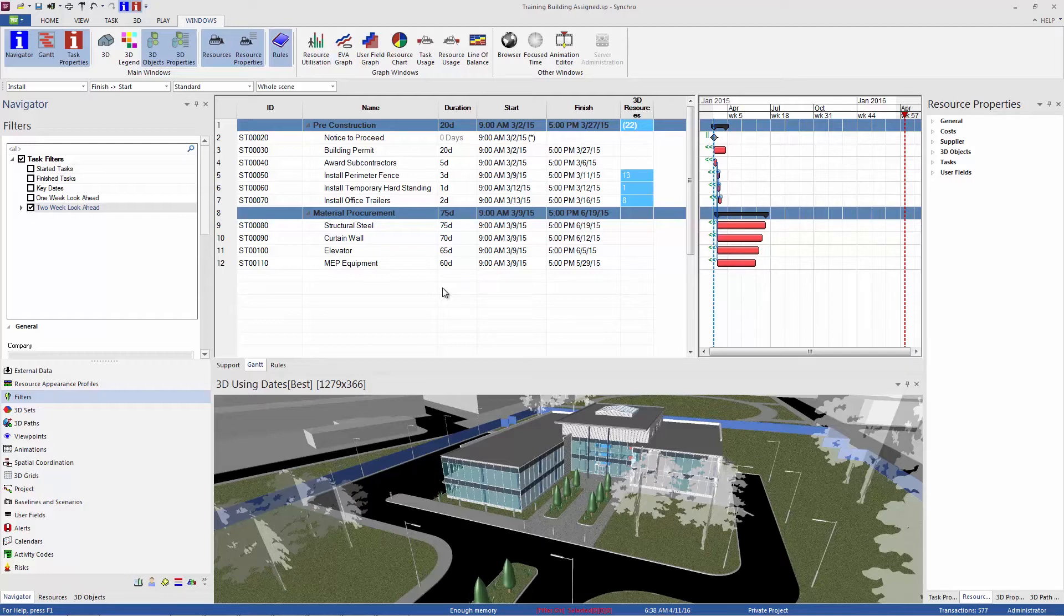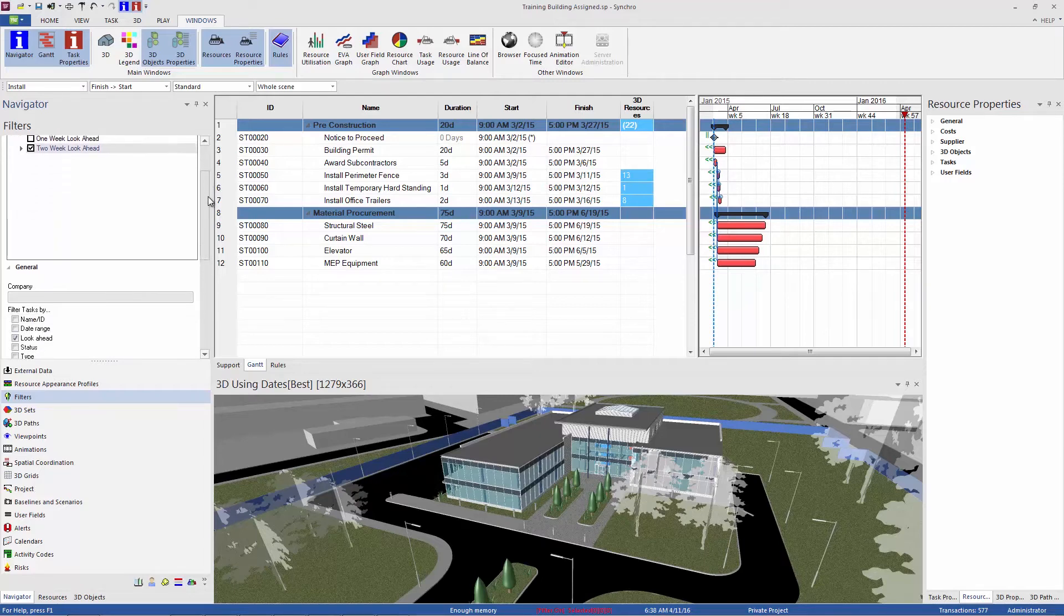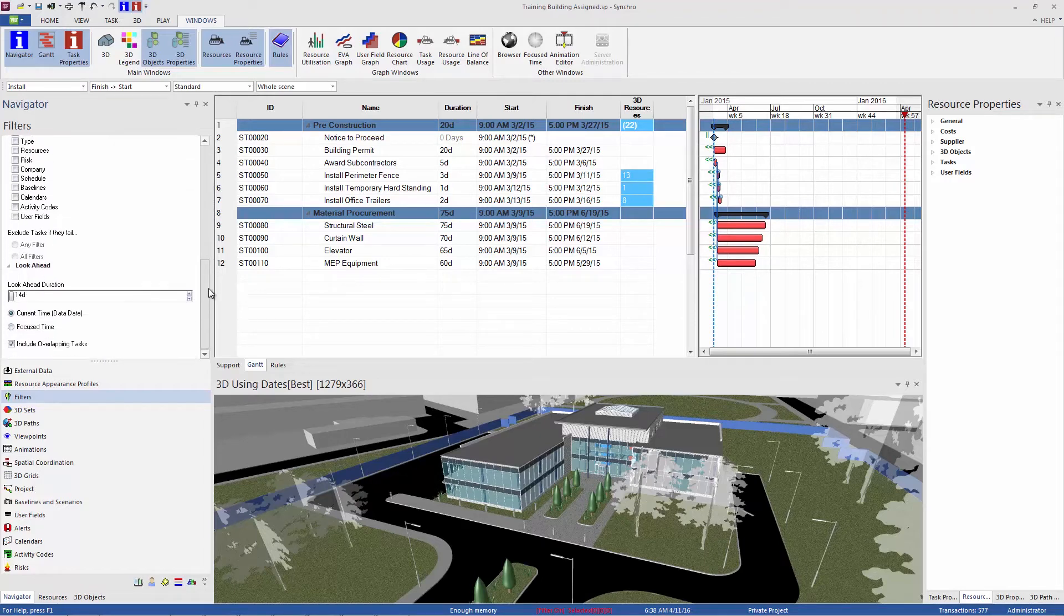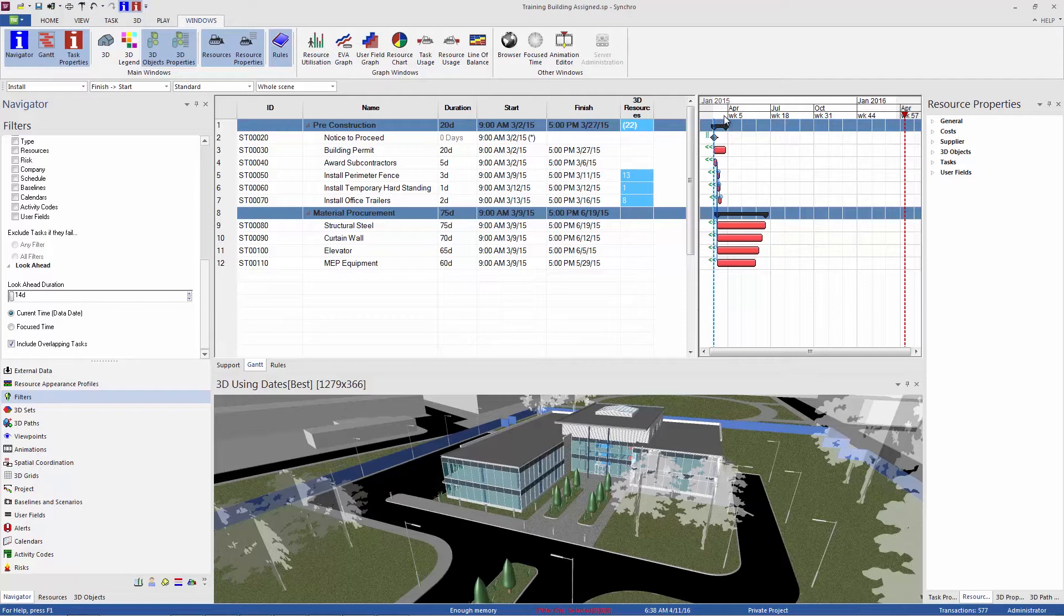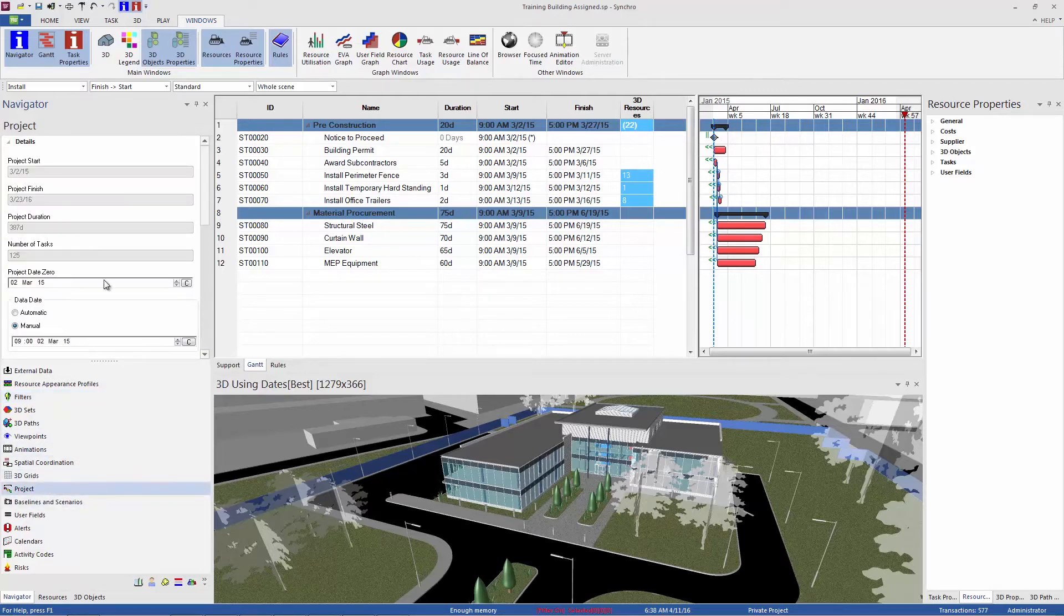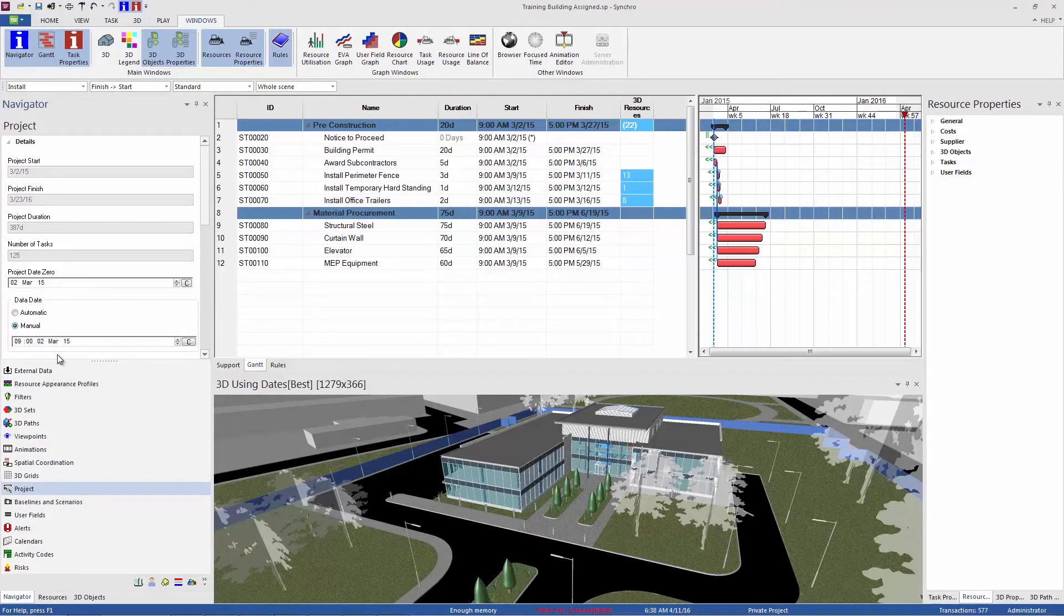Where are those two weeks starting? That we can see by scrolling down below to the look ahead panel. So we're seeing 14 days from our data date, and the data date is this blue dotted line you can see here in your Gantt chart. You can also check that date in Navigator project under details. So we're looking at two weeks from March 2nd.